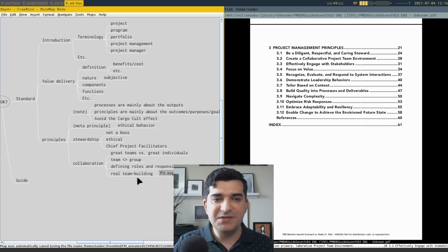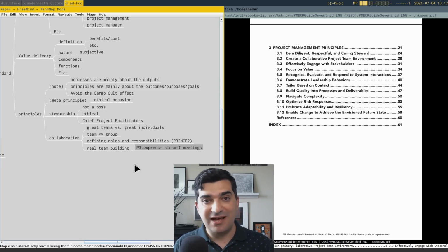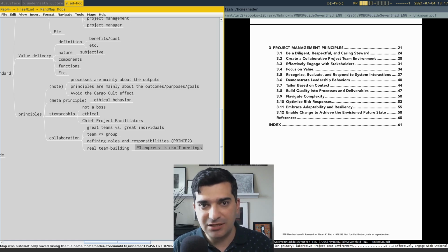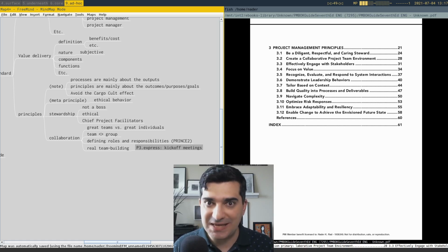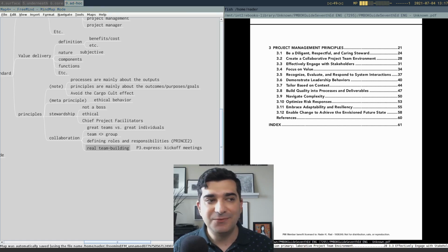And for the kickoff meeting, there are two purposes. One is the typical purpose that you have where you want to communicate certain types of information and align everyone. But the more important thing in those kickoff meetings is to use it as an opportunity, as an excuse for team building. And it's something that happens frequently, so it's not a one-time thing. You have monthly kickoff meetings as well, so it happens again and again and again. So this is about collaboration. And what's the next one?